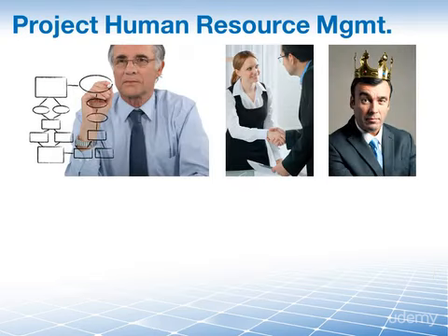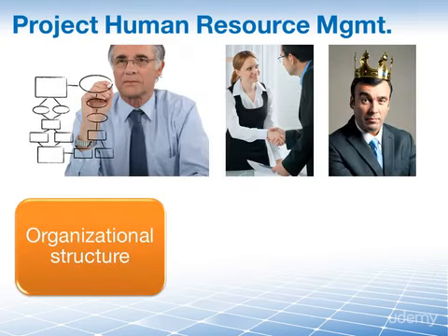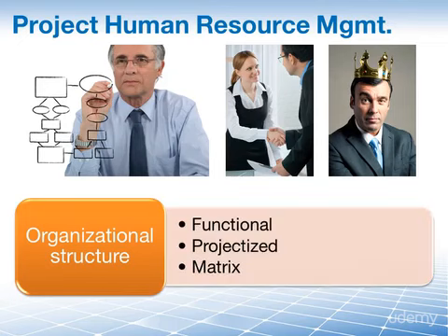The second one up for discussion is the organizational structure. You may work within a functional, projectized, or matrix organizational structure. The organizational structure defines who has the authority to hire and bring people onto your project.